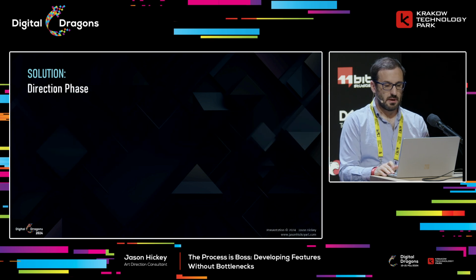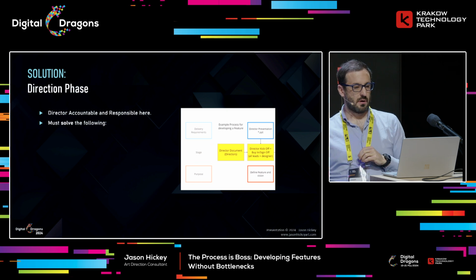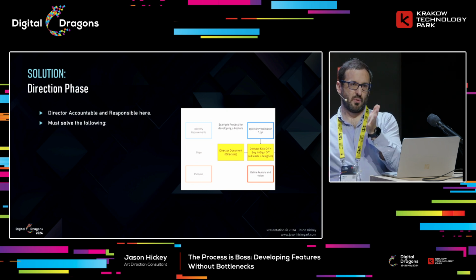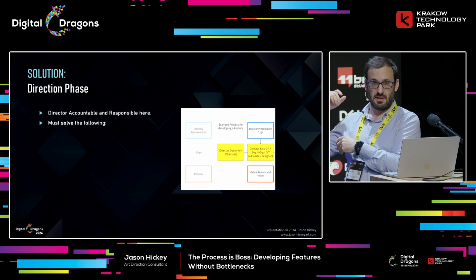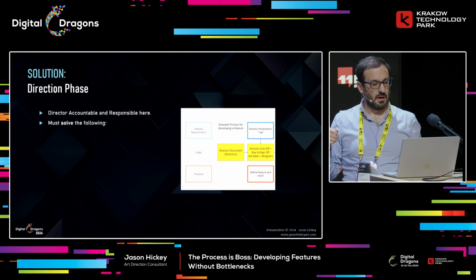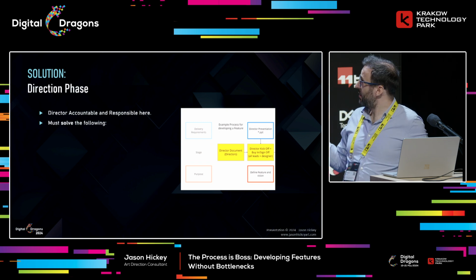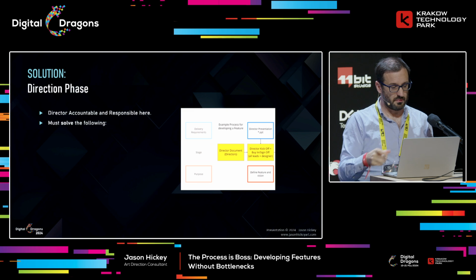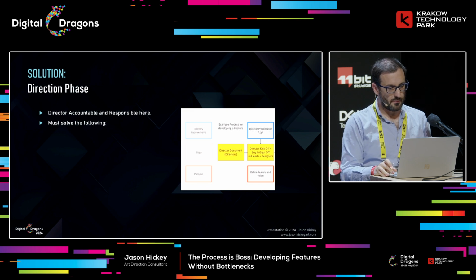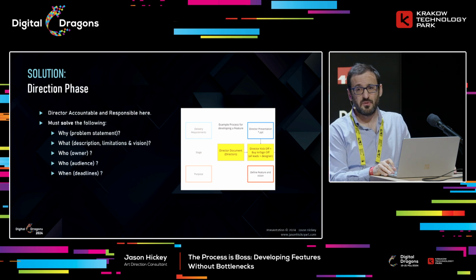So director, quick note for here: the blue borders are the deliverable required to sign off at the yellow box, which is the gate. This is your big sign off. The red box is the purpose. So if you do take a picture, hopefully you can read it, and you'll remember what each stage is for. The director's really accountable and responsible at this point. So they're going to be making a vision document and then doing a kickoff.